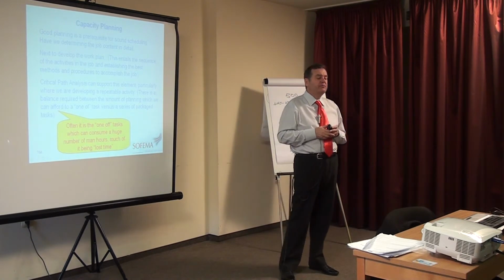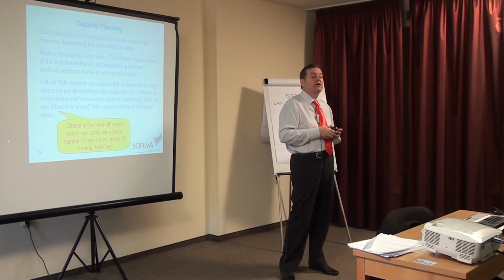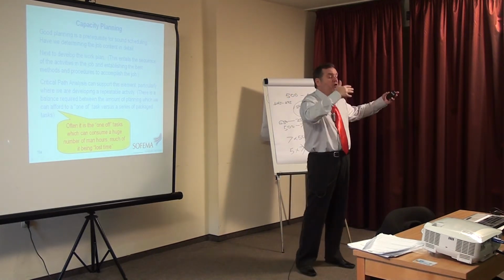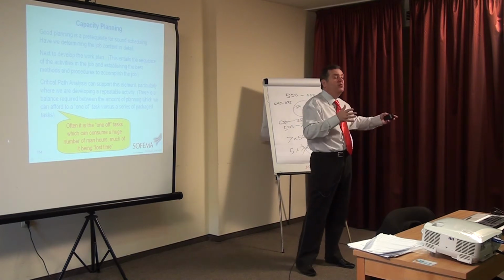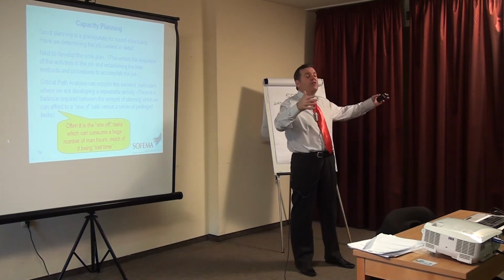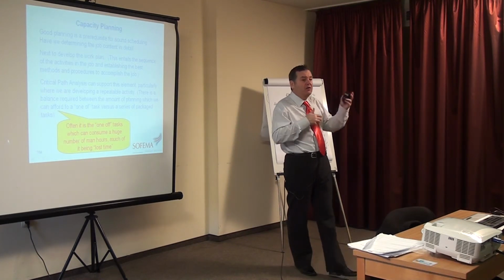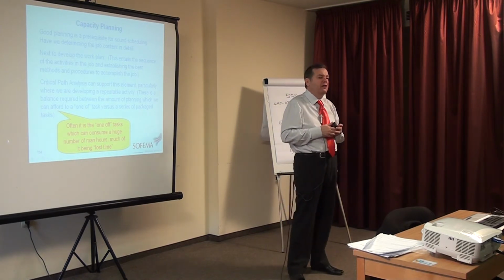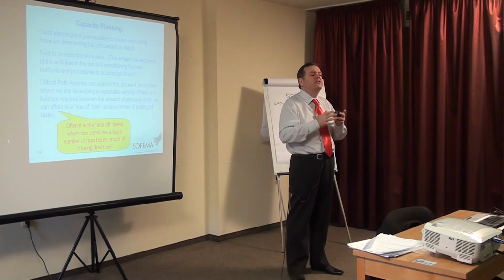For example, you cannot do this check until you've done the first check. It has to follow. Therefore, that check followed by that check is on the critical path. And when we have to do both of them depends on how long it takes within the context of the overhaul availability. And by looking at critical path, by analysing, you can actually bring a check into a tighter time frame.